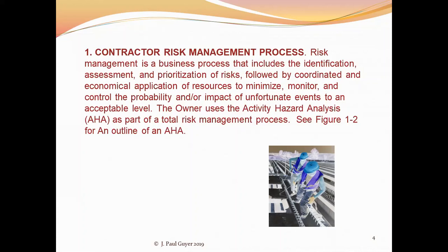This is something that you, as a construction manager or construction supervisor, or even a worker on the job, need to take a look at the likelihood that this type of incident will occur, and the consequences of that incident, and then you use your judgment to balance those two, and you do that on all of the hazard potentials associated with whatever your activity is.